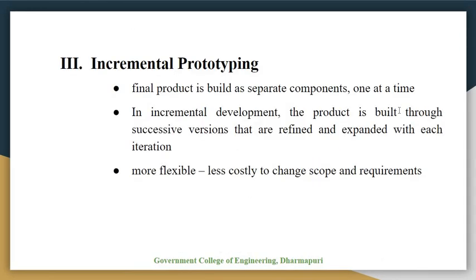Next we will see incremental prototyping. In this, the final product is built as separate components one at a time. There is one overall design for the final system, but it is partitioned into independent and smaller components. The final product is then released as a series of products, with each subsequent release including one or more components. This approach is more flexible and less costly to change scope and requirements.